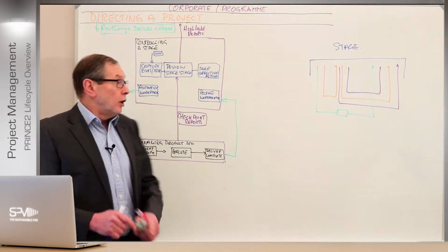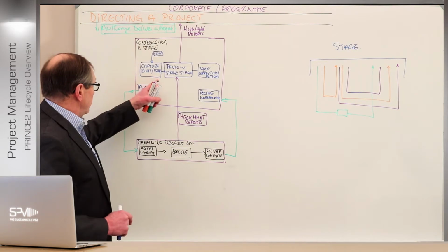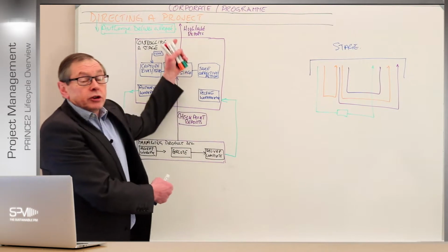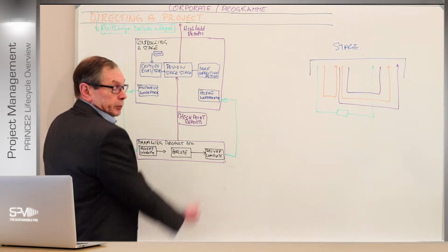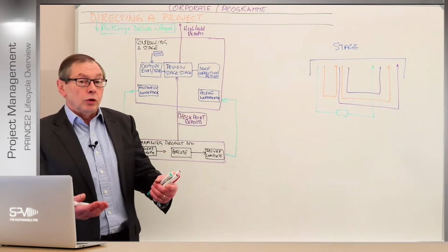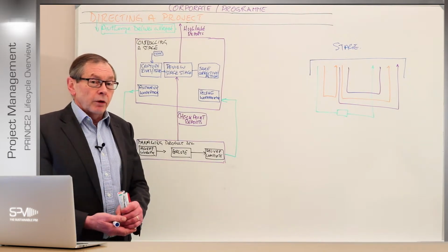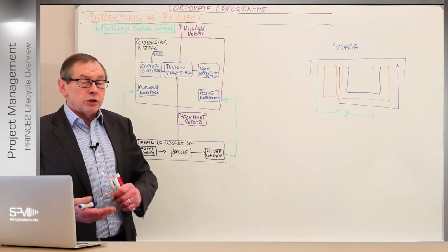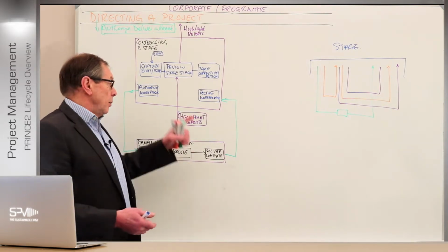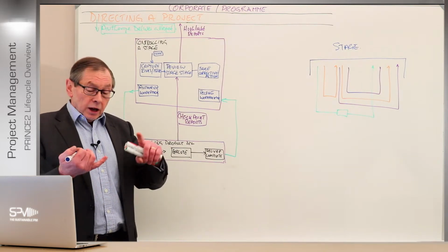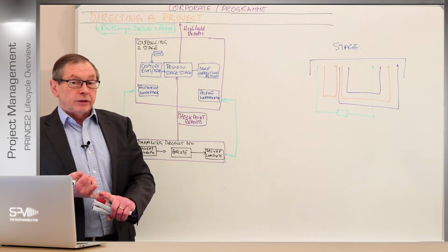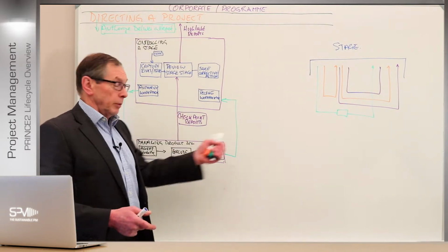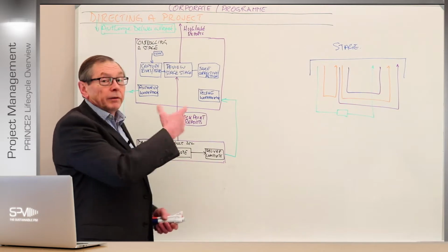It's about empowerment. So what will happen is an issue will come into place from wherever. It could be an issue to do with some specification build or a change of scope from the top, or the specification from underneath. It's an issue, and the PM now has to deal with it, right? And we look at all this, the configuration and the change management, issue management, in another session. But what happens now is that the PM is going to decide, is it within my remit to fix that up? Yes or no? If yes, then the PM can do something about it and fix it up, but obviously document the first thing you're going to do, but fix it up.